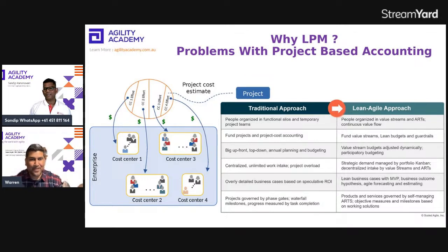Yeah, that reminds me of my experience working with one of the biggest MNCs, where because they had this annual funding cycle, and I was coaching at a portfolio level, at the end of the financial year there was a struggle to just spend the money which was allocated, because next year you will get allocated only if you have been able to spend whatever money has been given to you last year. Yeah, so that is actually an anti-pattern, which sets wrong precedents where program managers and project managers just spend money because they want to get more money in the next annual cycle. Yeah.